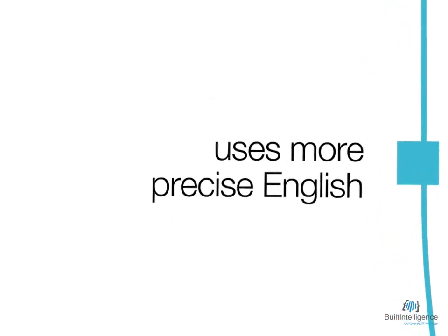They eliminated the use of the words fair and in the opinion of from the contract, and minimize use of the word reasonable, as these are highly subjective and tend to lead to dispute. Instead, they tried, and by and large succeeded, to express much more precisely things such as defined terms in Section 1, definitions of compensation events, and the criteria by which they are assessed, and, as previously stated, criteria by which the project manager accepts or does not accept communications from the contractor.